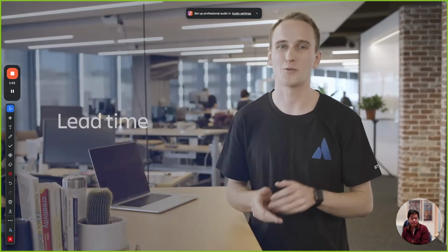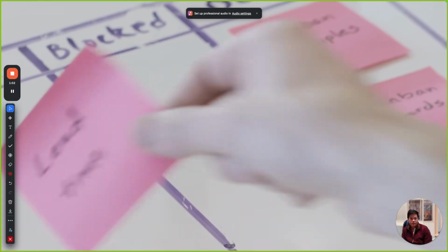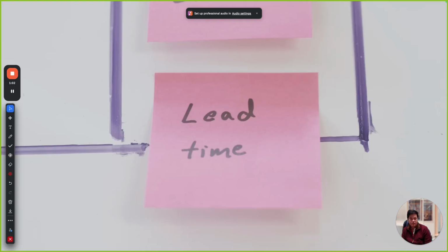Once you understand flow, you can start to measure it. Kanban teams concern themselves with lead time, which is the time that it takes for a card to flow through your workflow from when you start working on it to when you're done. It's in the hands of the customer. And with that, I feel done with my conversations about lead time. And thanks to this board that I built, I actually know that I'm done. I have visual assurance that I've done all the things that I set out to do in this video. It's a good feeling.